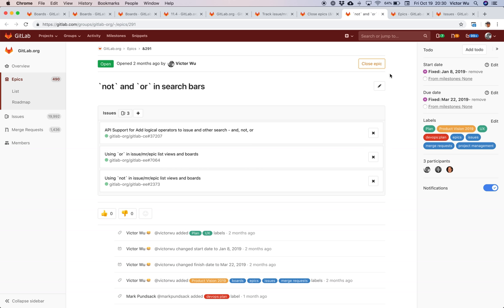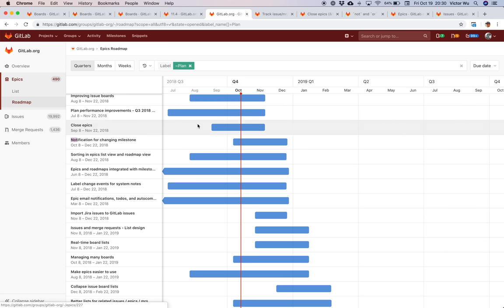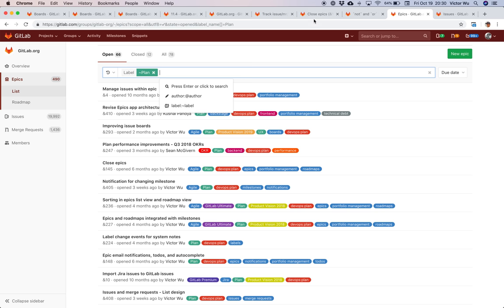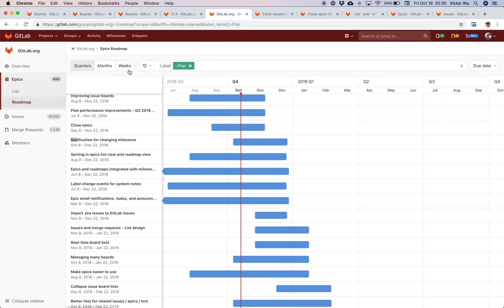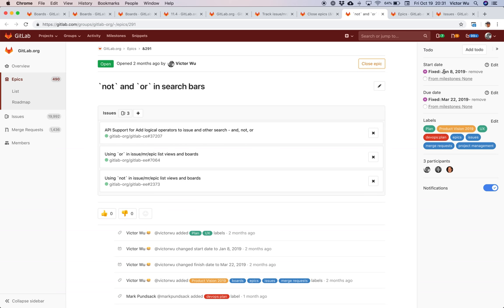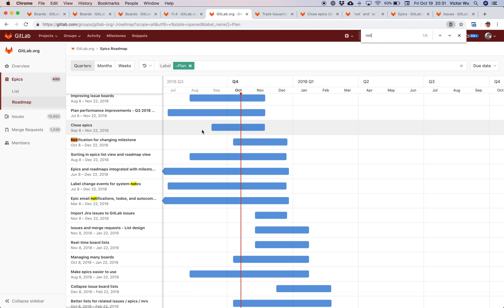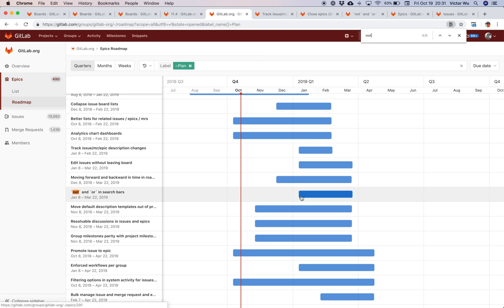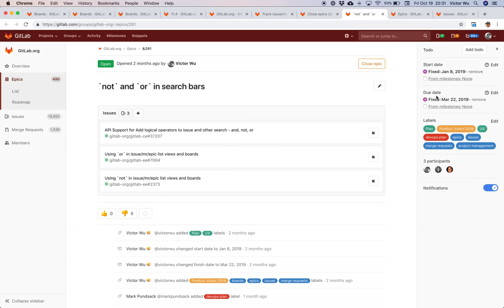What's really relevant is something called the roadmap view, which we think is pretty awesome. This roadmap view shows all the epics that are relevant — again filtered by plan — but instead of showing rows of data, we show rows of timelines. This particular epic has January 8th as the start date and March 22nd as the end date, and you can see it on the roadmap precisely matching what was set.